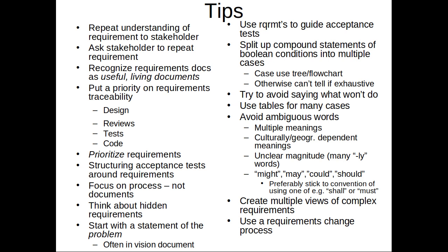So the fact is, in 6 months' time, user needs may actually evolve quite a lot. More to the point, perceived user needs may evolve. The bank you're doing IT for could merge with another bank. The way reporting is done within the organization undergoes changes. Now they need these extra fields, what have you. And if you don't have a requirements change process, you're potentially going to get henpecked to death all along that 6 months. Because they're going to say, well, something changed, I'd like to have this, I'd like to have that. And if you don't have a formal way to handle it, those things just leak into the process.